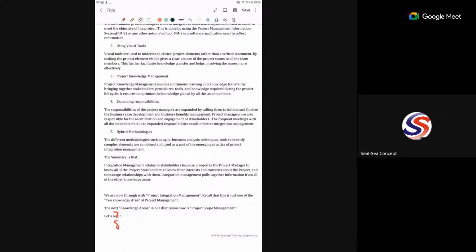I said any project that is very short term, you can use your waterfall method to do it, which we call predictive life cycle. But if you are handling a project like a website, you better use your iterative method, so that you'll be doing it in bits.